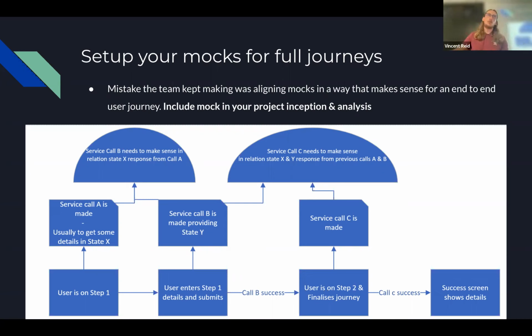You don't need to mock all 15 endpoints. Mock the ones in the beginning, allow your devs to do some integration code. If it's backend mocking, allow your devs to do some front-end code. And more than likely, by the time you've done your first few endpoints, your first few screens, the endpoints you needed from your backend teams, your dependency teams, your external providers, or whatever the case is, will start giving you those final endpoints, and therefore you can start doing verification and all that good stuff. And you've kind of bought yourself some breathing room. So this essentially ensures that you have the delivery train going. You make sure you're not doing too much, kind of a just-in-time approach.